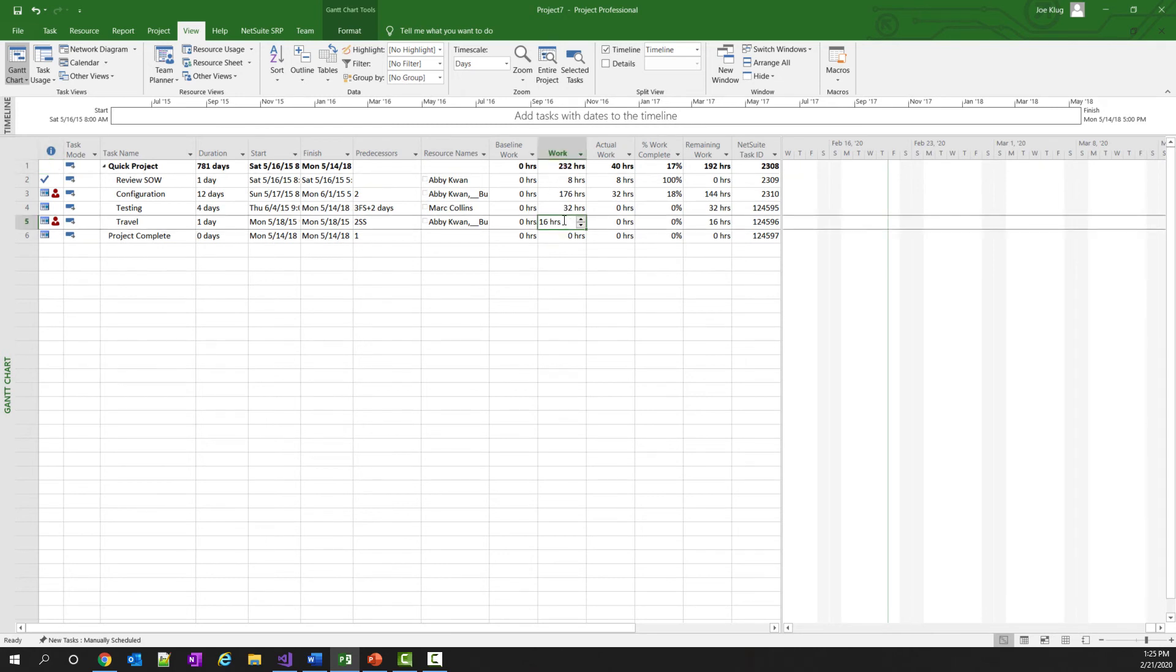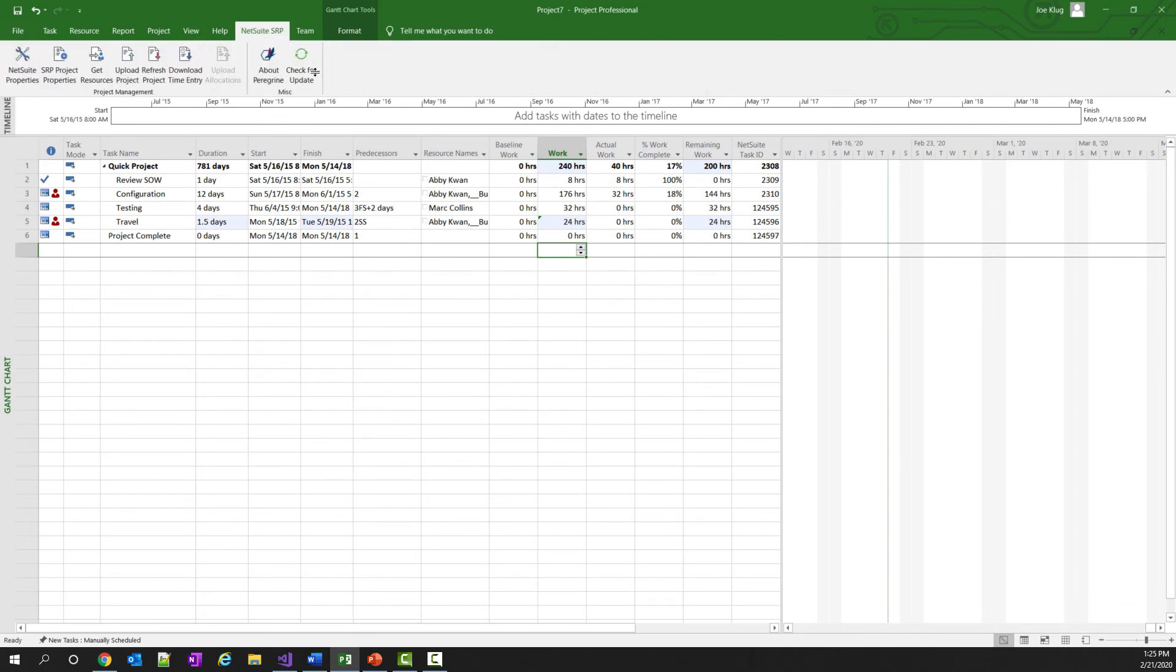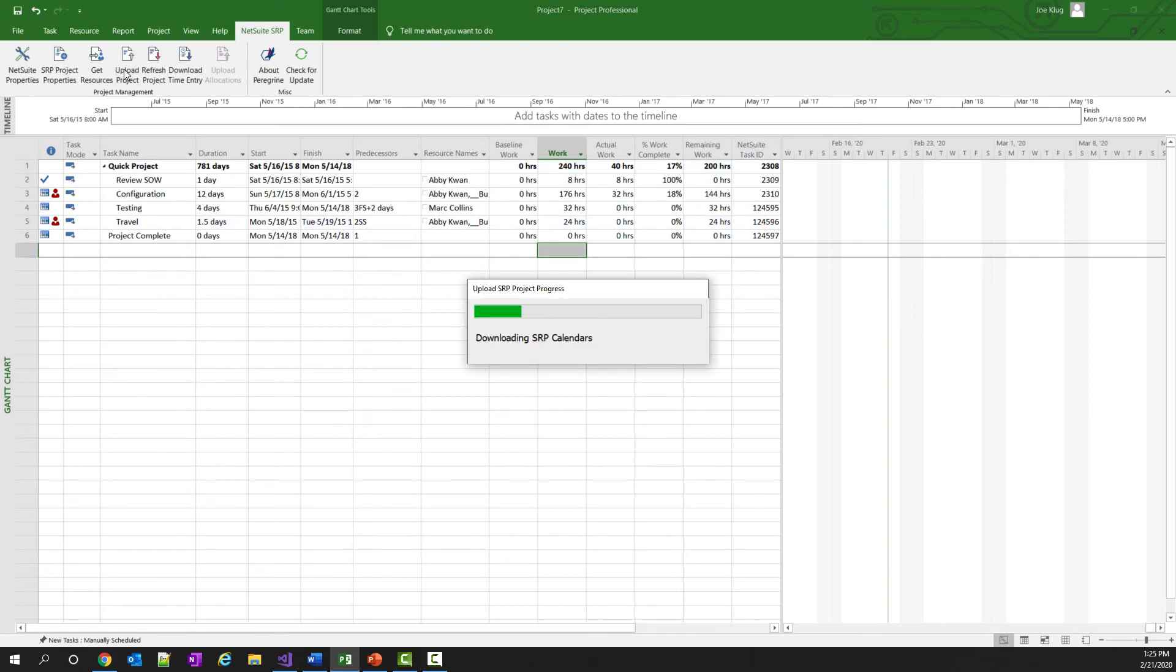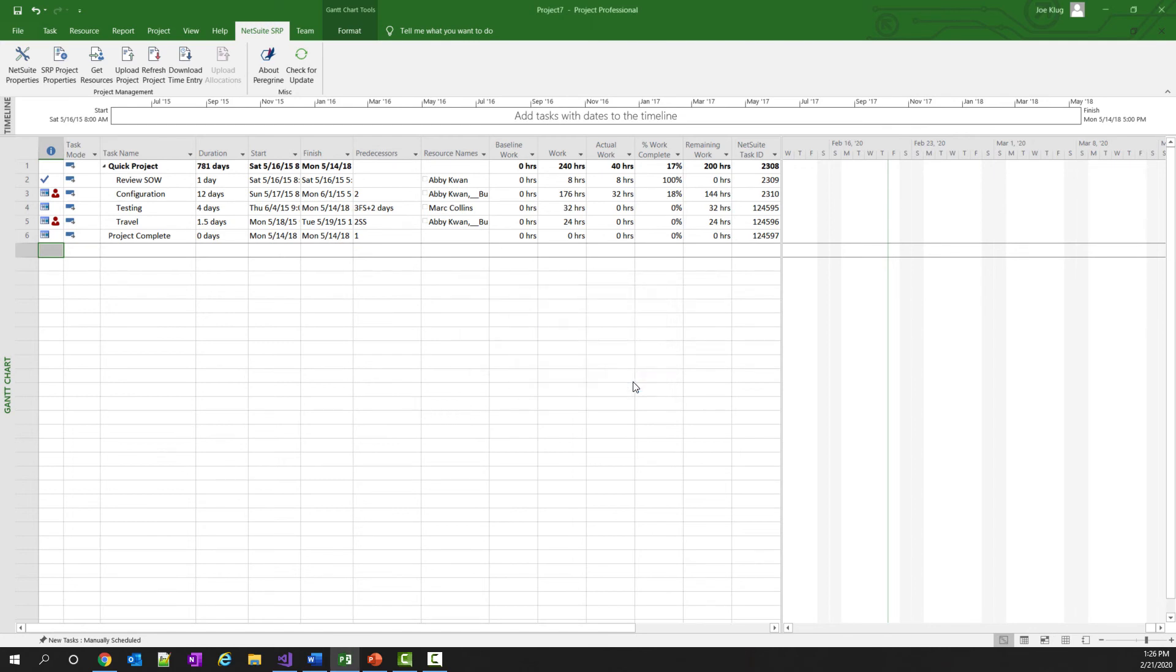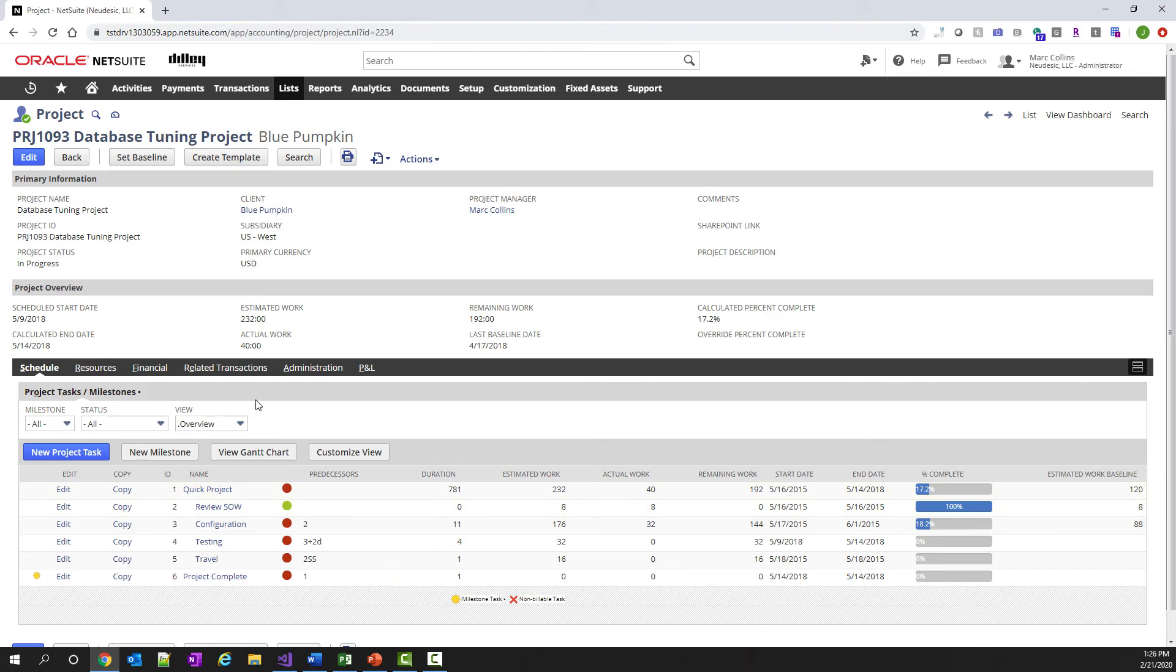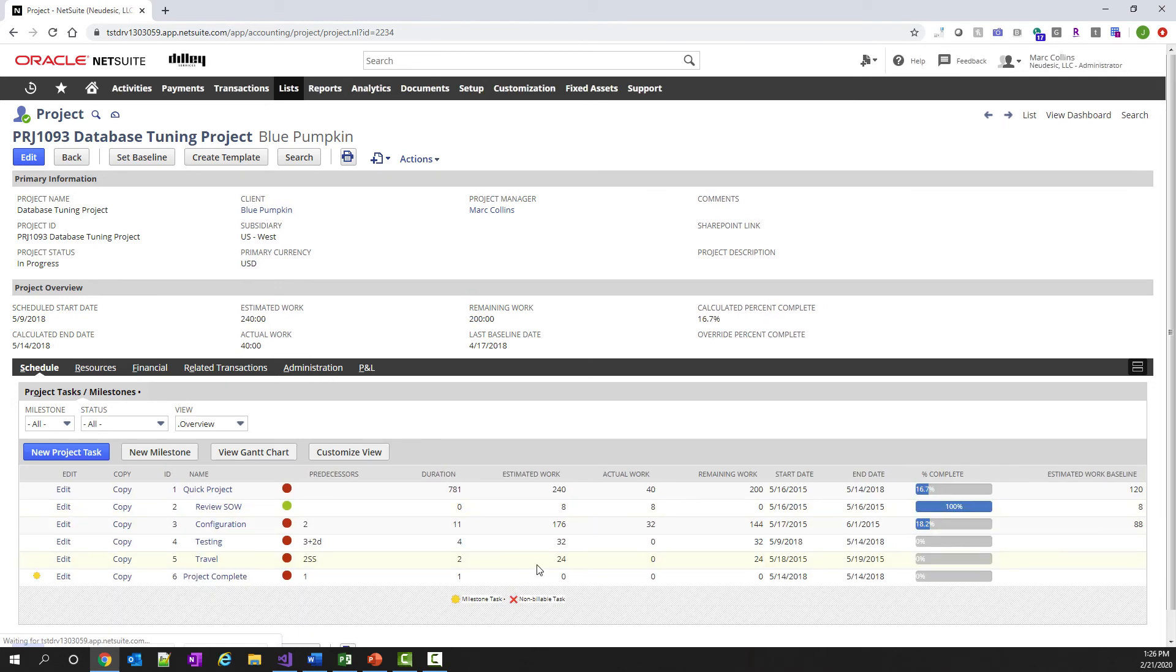Now, let's say that your project manager decides that it's going to take longer for travel and they want to up that value to 24 hours. So let's just go ahead and change it, go back to NetSuite SRP tab, and click the Upload Project button to push these changes from Microsoft Project into NetSuite SRP. It'll take a few seconds. We'll get a notification that it's completed. And then I can navigate back to NetSuite SRP, refresh my browser, and you can see that my estimated work has been changed to 24 hours.